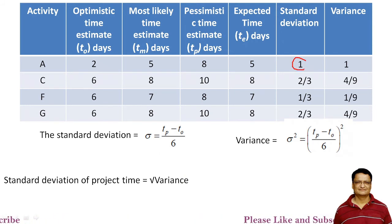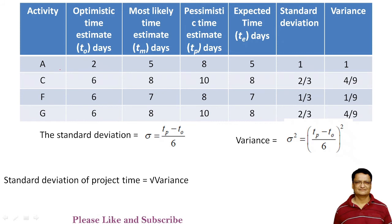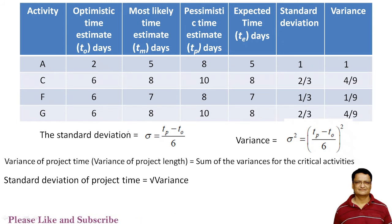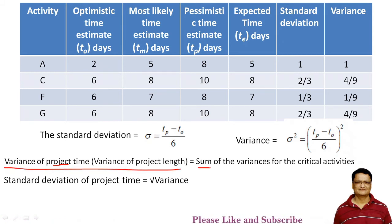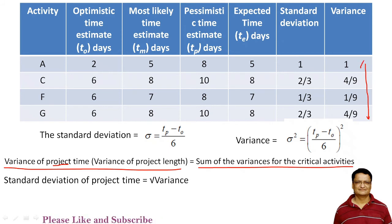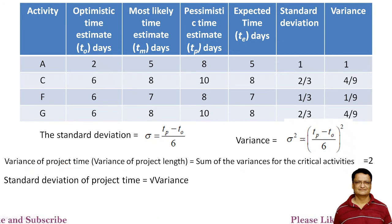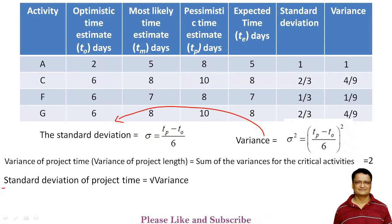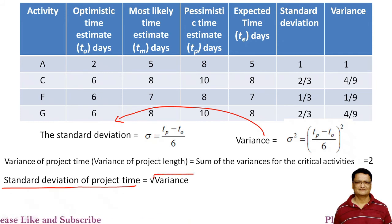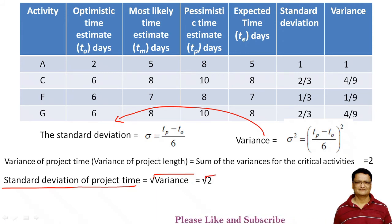These standard deviation and variance values are related to individual activities, but we need to calculate the standard deviation and variance for the complete project. The project variance is the sum of the variances of all critical path activities. Adding all four values gives us a project variance of 2. The standard deviation of the complete project is the square root of this variance, so σ_project = √2.